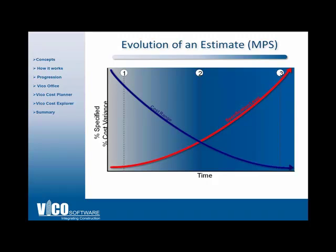Most of you are already familiar with this graph that shows how a project progresses through time. On the vertical axis it shows how specification levels and variance decrease and increase. The blue graph shows the cost range — as you start your estimate, your cost range and variance are high and the specification level of the design is low. As the estimate evolves, the specification level becomes more complex and higher, and the cost range and variance decrease. By the end of the job when you formulate your GMP, you'll have a very small cost range near zero and a high level of specificity.